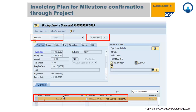The same process works for the sales order in PS-SD integration. You have a WBS with milestones assigned to the activity or WBS element. That WBS is copied into a sales order, and all milestones get copied along with a reference number. Once you confirm the milestone in the Project System, the milestone block is removed in the sales order as well. This is the integration of PS with MM and PS with SD.